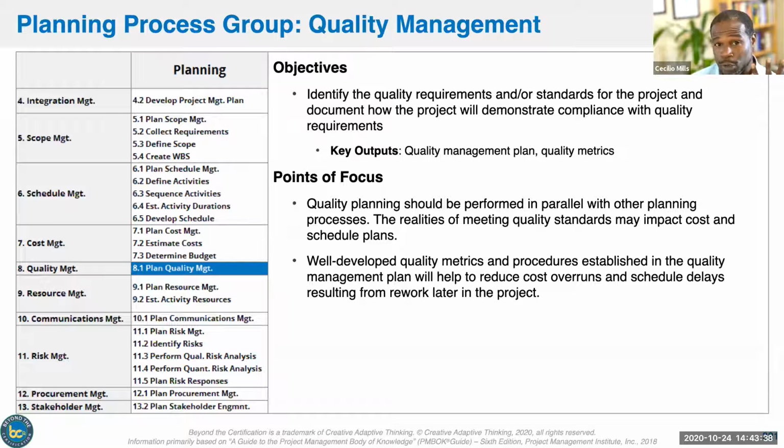But now you have 4 grades of nuts and bolts. The one that'll expand and contract 5 each way, that's the minimum standard for the Department of Transportation. I can charge you $1 per nut and bolt. But the one that will only expand and contract 1/100th of a millimeter, I can charge you like $1.99 per bolt because that's a higher grade. Both have high quality. This one's just slightly higher grade. So that's the idea from PMI about grade and quality.